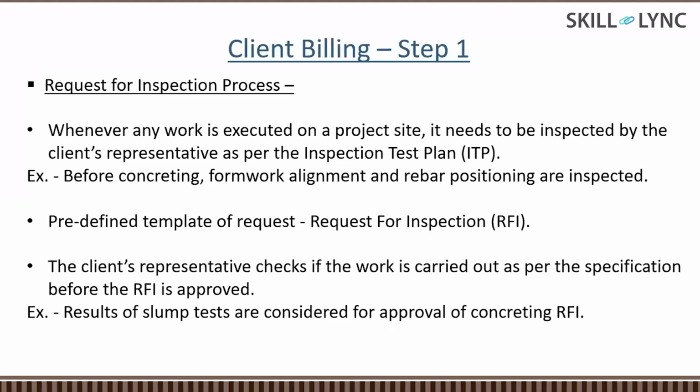And in that template, entire things will be mentioned over there: on which day this work was executed, what work was executed, whether any abnormality is there or not, whether the client is satisfied with whatever has been executed or not. If he is satisfied, then he will sign this document. Then he will keep a copy with the contractor, that will be available. So this is the first step, on a day-to-day basis, this will be happening.